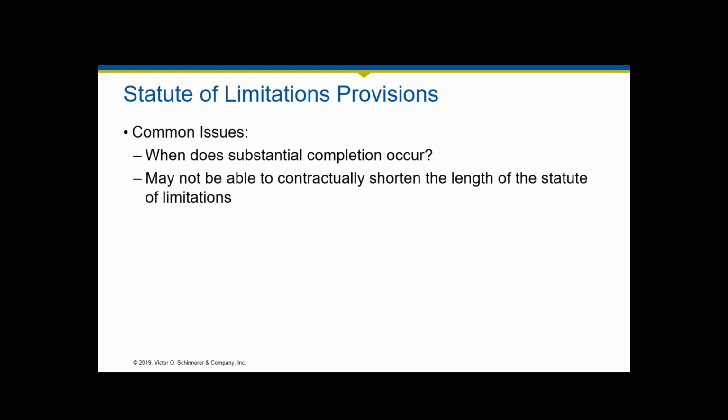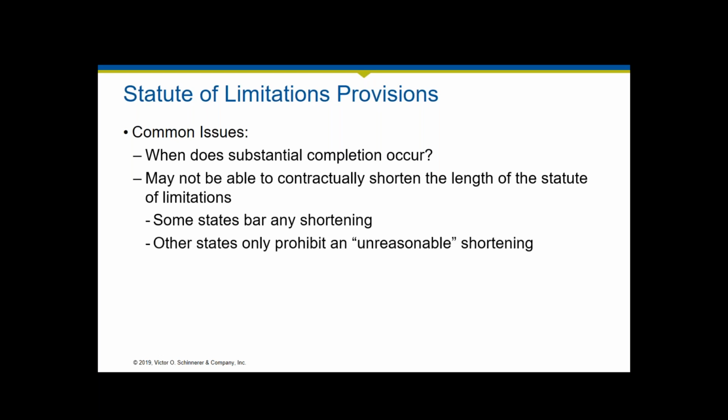Also, you should realize, depending on your state, that some states may well bar any shortening of the statute of limitations. So if that's the case, you need to be aware of exactly what your state limitations are so that you can know exactly to what extent you've been able to limit that risk. And in other states, they only prohibit what they call an unreasonable shortening. And that really, I think, is just a case-by-case determination.